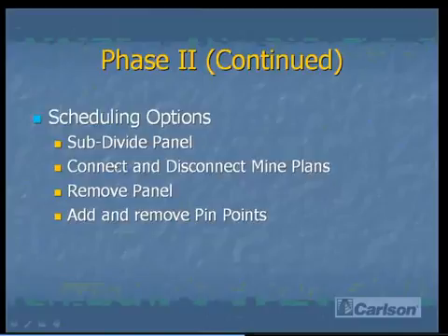When we disconnect the mine plans, what we're saying is that a mine plan, according to the terminology and definition that we use in this workflow, is a list of panels to be mined. And sometimes you cannot place your entire list to be mined at one time, so you have to place a certain number of them, and when they're placed together they become a mine plan, and you can connect different lists together, and also you can disconnect panels from a mine plan.